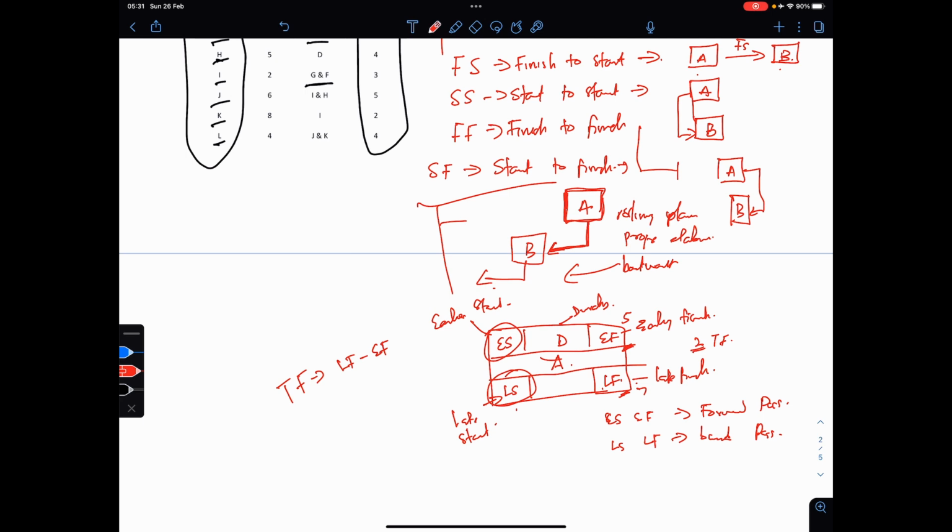Okay, in some cases, when you're using software like Microsoft Project or Primavera to plan your program, you might tend to have negative total float. The reason behind that is because probably you've got a constraint on your end date, or you are running behind schedule. That's why you have a negative total float. Okay, so we'll discuss that later on.